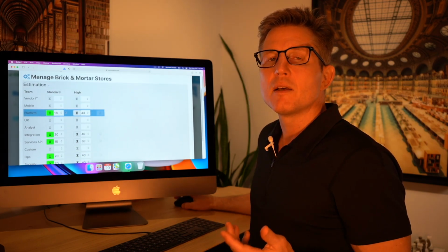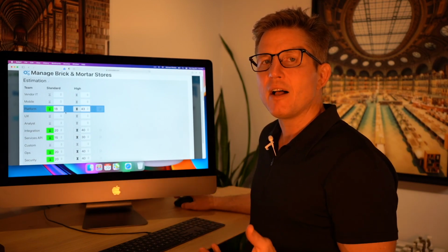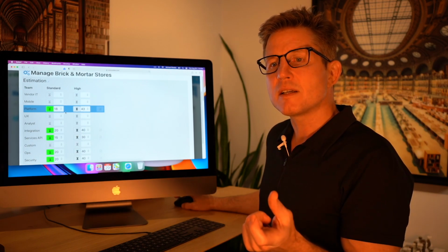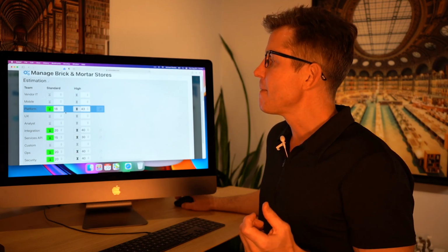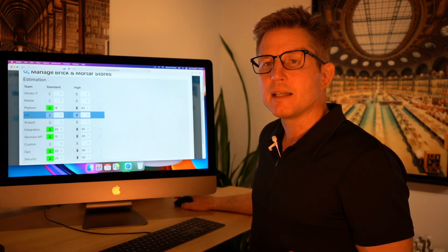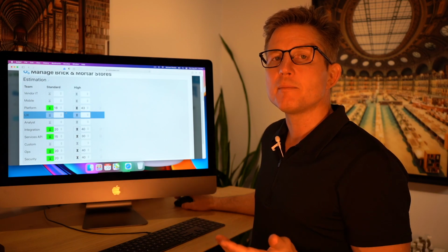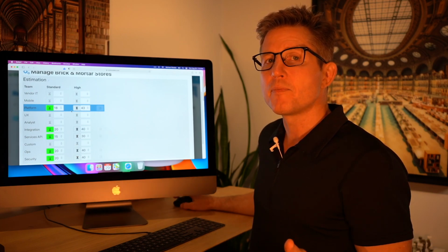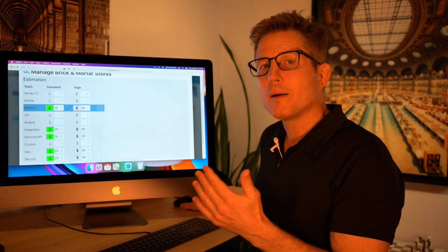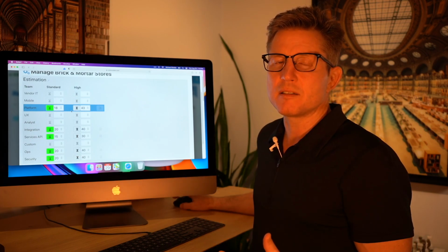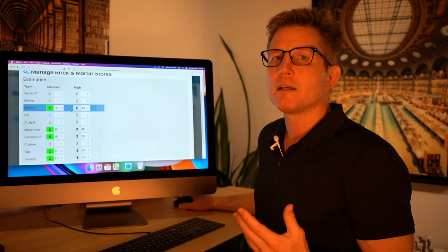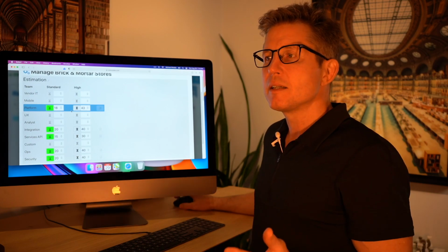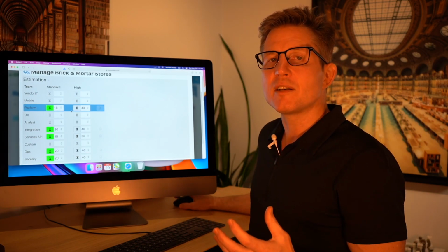So we assign an optimistic and pessimistic value for the amount of time it takes on a team per team basis. So this allows us to have a parametric modeling technique. It also allows for an analogous technique in which we can have experts from each team provide their estimates that are relative to a specific component. Now, we're not asking them to do this requirement by requirement because that's much too exhaustive and we would have to wait too long to actually get that estimation.